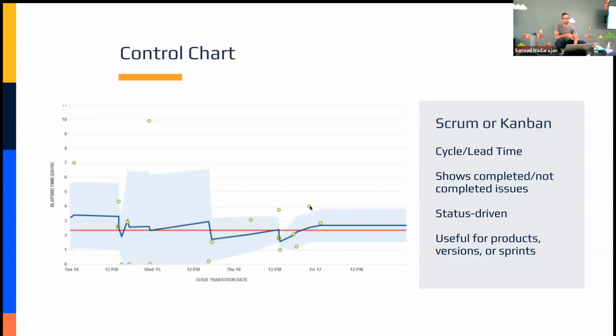That's correct. Okay. Yeah. So I can see here that this data point is for an issue that was transitioned on this particular date, and that was the cycle time, calculated right there. If you see a solid colored dot, that represents a cluster of issues that were close to each other, that they're just grouped together. So that is what that difference is. I do apologize that I don't have a more interactive example. It was hard to stand this up in a sandbox environment, but that's what those points are reflecting on